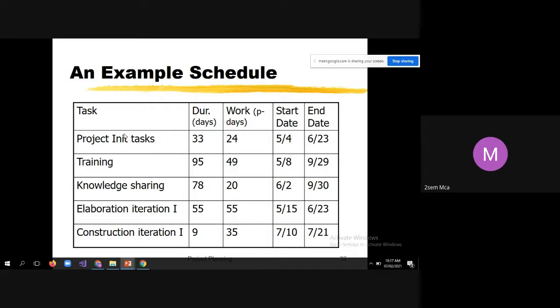And at the same time, knowledge sharing is very much essential, especially when you are changing the resources. Say, for example, there are 5 members in your team. Due to some reason, one of your teammates is leaving the job. So before 1 month, you have to hire one more person, so that before the leaving, the developer will tell him what tasks he was doing as part of that project. And he will make him understand what the work process there is, everything. So that is called knowledge sharing.